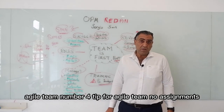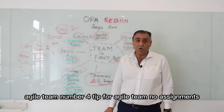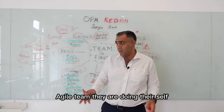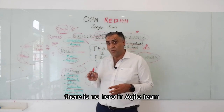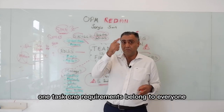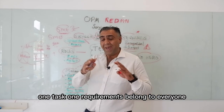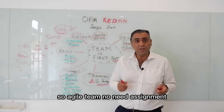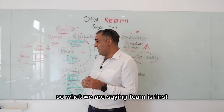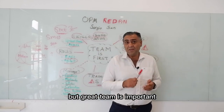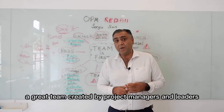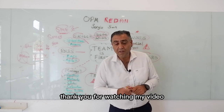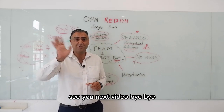Tip four: Agile team — no assignments. An Agile team is self-managing and self-organizing. They choose what they will do. There is no hero in an Agile team — one task, one requirement, belongs to everyone. If one person fails, everybody fails. So in Agile, no need for assignment. What we are saying: team is first, but a great team is important. Great teams are created by project managers and leaders. Enjoy creating your great team. Thank you for watching — see you in the next video, bye bye.